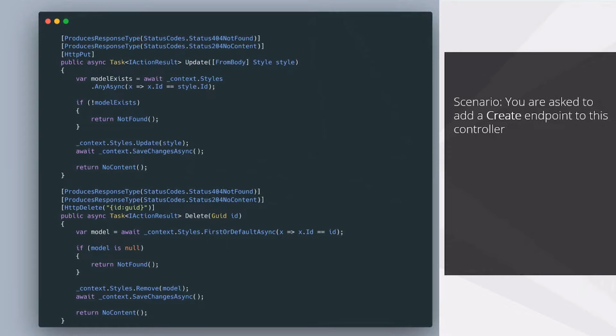So it's our responsibility in this PBI to refactor some of this. Maybe we'll just move the data access to a service or some other layer or a separate project, just a tiny thing. Anything little, you've got to do for the rest of the file and commit that as part of your feature. And I got one question, do I keep this as part of my estimate and track it against this PBI? And yes, because you should review it and say, well, I'm adding tech debt to add this feature, to do it properly. My expectation is to do it properly, like in that start quote. To do it properly, I need to make it better. So you've got to refactor this. So we shouldn't add it in the same style as the existing code.